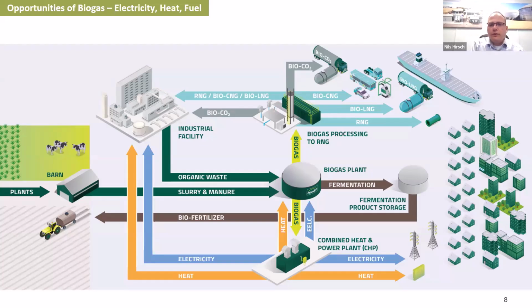Later on, with each single step, it gets more and more expensive. You don't want to change drawings. You don't want to make changes in detailed design. It gets worse in fabrication. When it's finally installed, it will be very, very expensive. So you have to focus on the early phases, that's key. Analyze your requirements. And that's where Planety is extremely good.